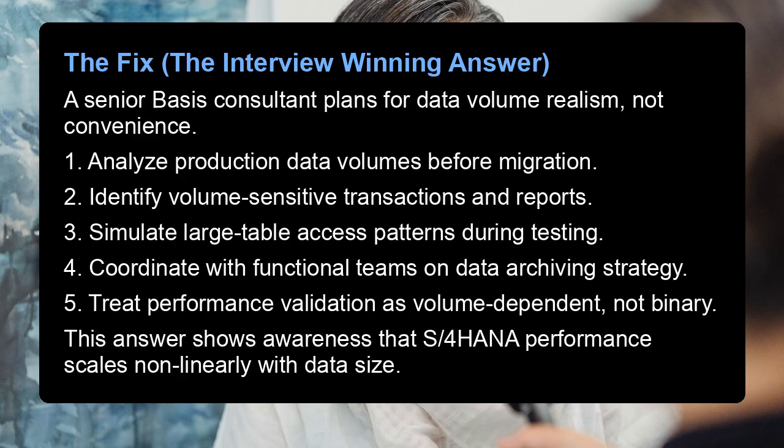The fix, the interview-winning answer. A senior basis consultant plans for data volume realism, not convenience. 1. Analyze production data volumes before migration. 2. Identify volume-sensitive transactions and reports. 3. Simulate large table access patterns during testing. 4. Coordinate with functional teams on data archiving strategy. 5. Treat performance validation as volume-dependent, not binary. This answer shows awareness that S/4HANA performance scales nonlinearly with data size.